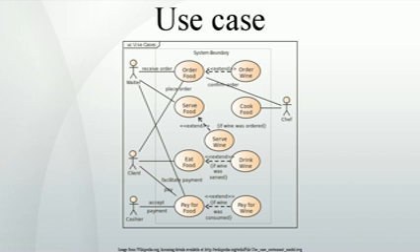Advantages. Alistair Cockburn lists 5 reasons why he still writes use cases in Agile development. The list of goal names provides the shortest summary of what the system will offer, even shorter than user stories. It also provides a project planning skeleton, to be used to build initial priorities, estimates, team allocation and timing. The main success scenario of each use case provides everyone involved with an agreement as to what the system will basically do and what it will not do.